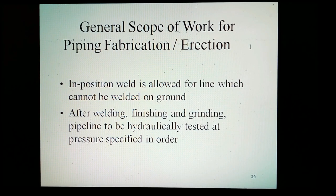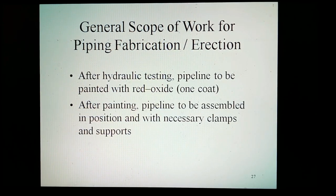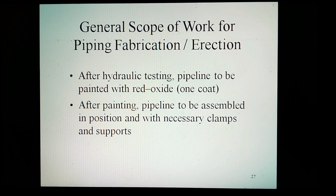Once in position, weld if allowed for lines which cannot be welded on the ground. After welding, finishing, and grinding, the pipeline is to be hydraulically tested at the pressure specified in the order. After hydraulic testing, the pipeline is to be painted with red oxide — one coat. After painting, the pipeline is to be assembled in position with necessary clamps and supports.